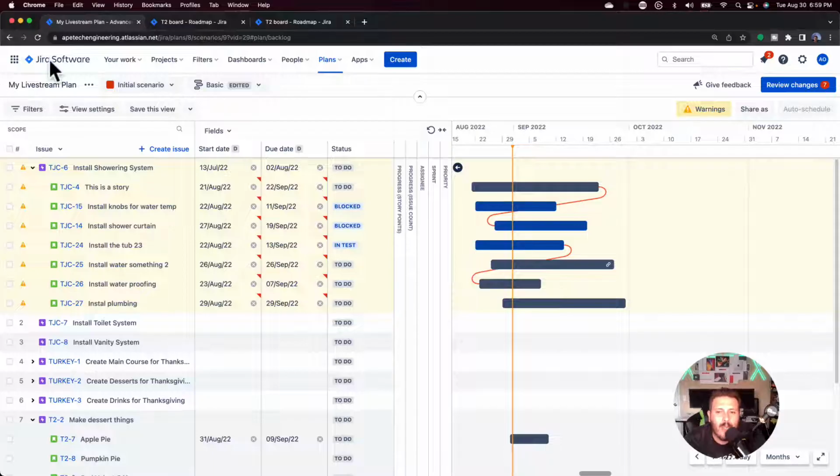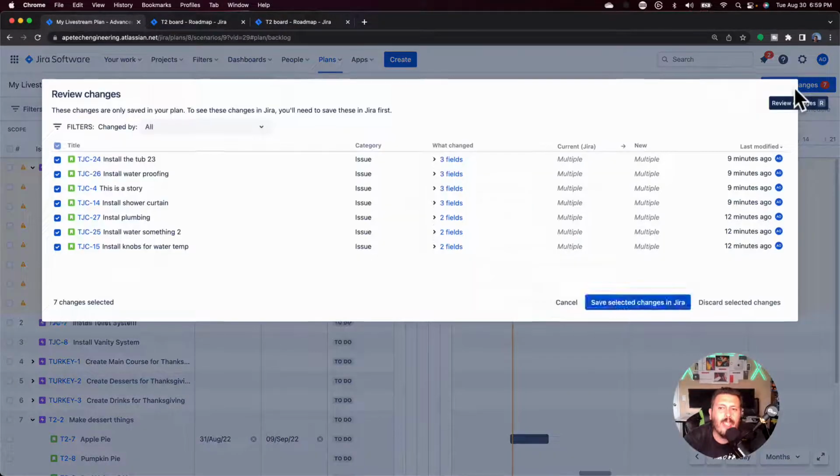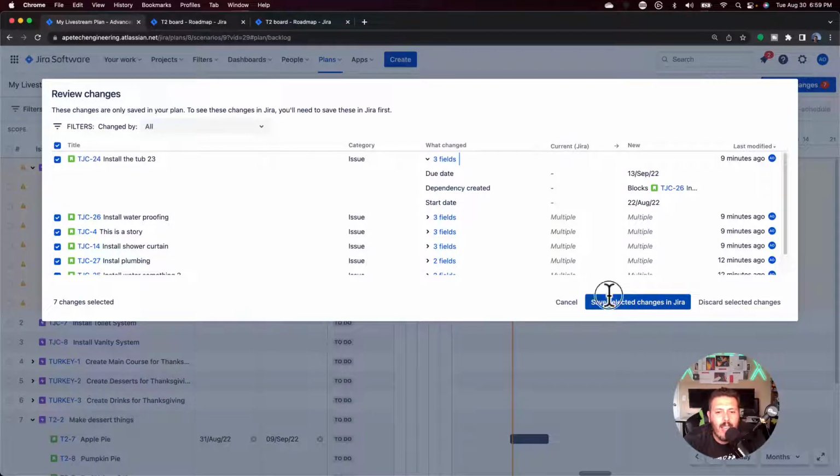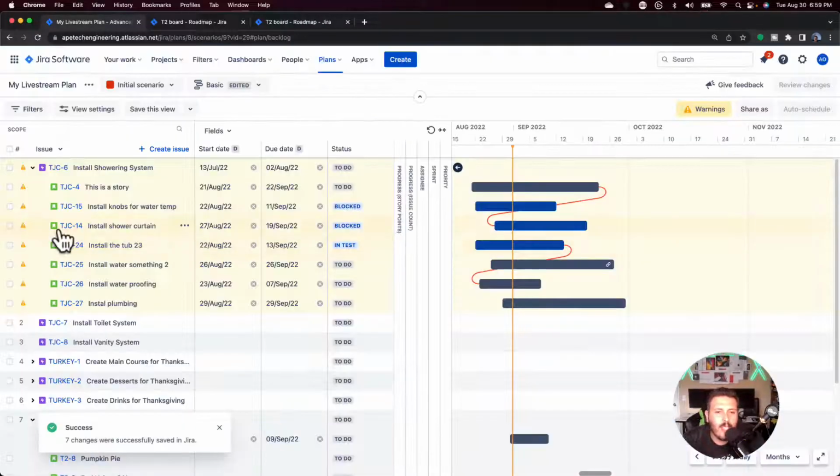In this view, you can do all your exploratory discovery work, and then when you're done, and only when you're done, do you push the review changes. You can review every change that you made, and then you can just hit push, or you can deselect. I didn't do it, but you can table them off, right? You can deselect them so they don't get changed.